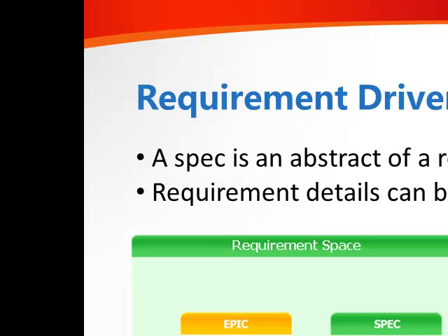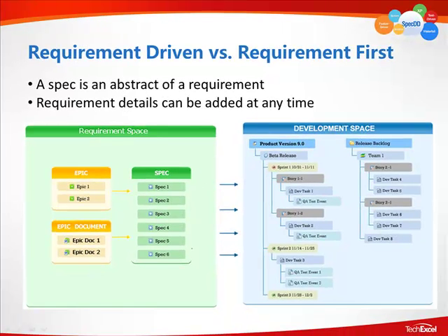And this is, of course, one of the 2 deliverables for every sprint in SpecDD. You need to update the documentation. We can accept change at any point, even in the middle of a sprint. We can update, we can change the requirement, the original spec. However, the documentation, the spec, the original requirement needs to be updated. Okay? So that must happen. We allow for it, and it also must happen. Okay? So that's really the main benefit of being requirement driven.